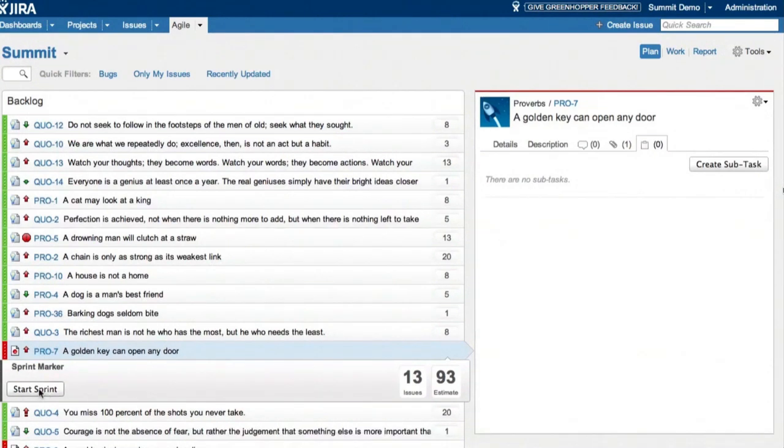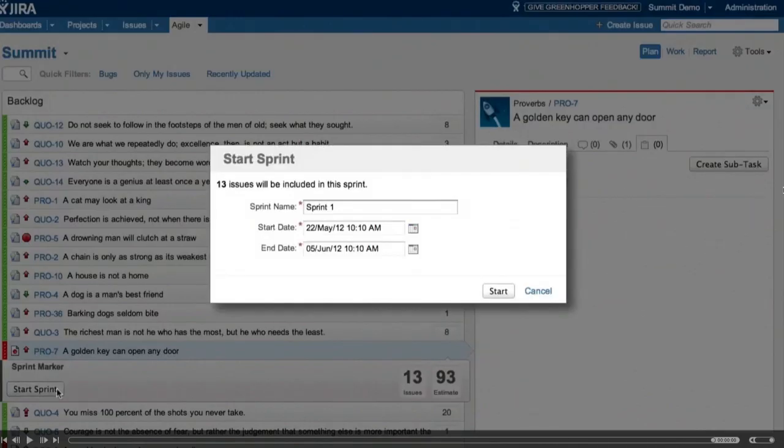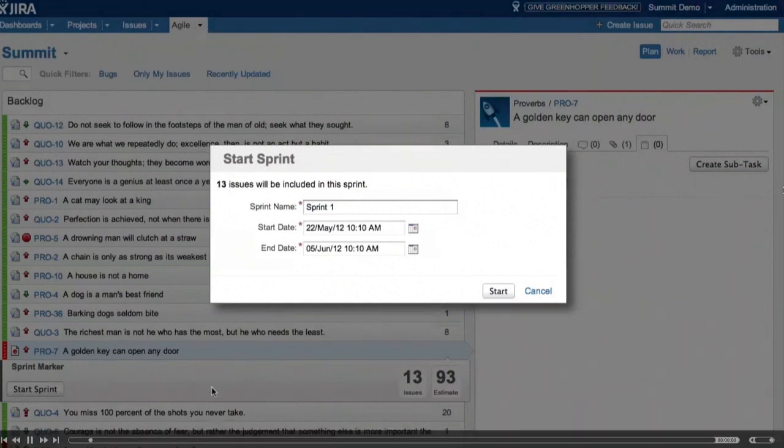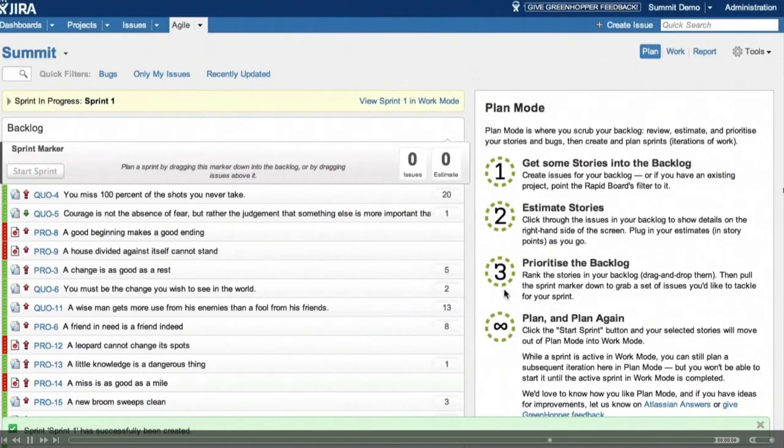So the team's now happy to commit to this amount of work, so we're going to start the sprint. We get to name the sprint. This also has some logic to try and capture the naming convention that you're using. And you can change the start and end date. The default is two weeks. So our sprint has now been created, and we'll go and look at that in work mode.